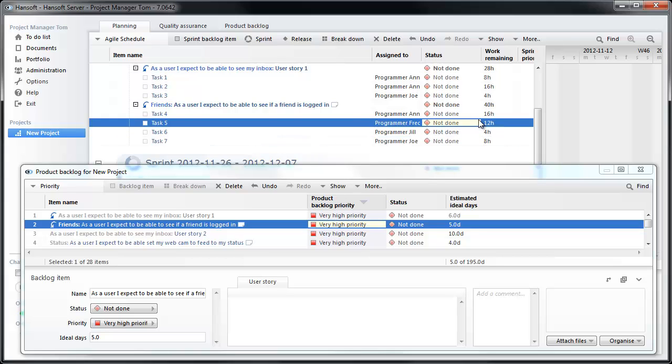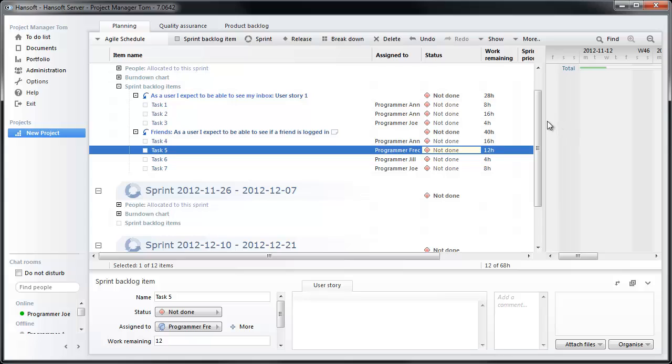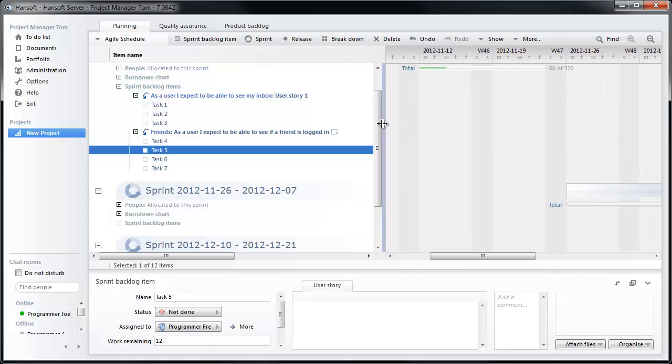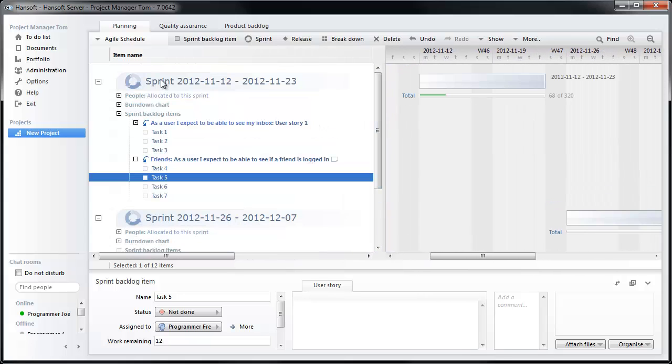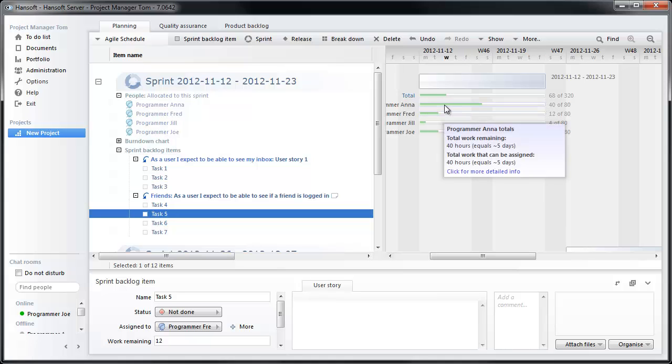And we would continue this till the team says no, we can't do anything else in this sprint. While doing this exercise, we can also use these as guidelines for how much work each team member has committed to. The goal is not necessarily to fill this out because that would mean that they would have to work very hard, but it's just to see how much work each one is allocated to.